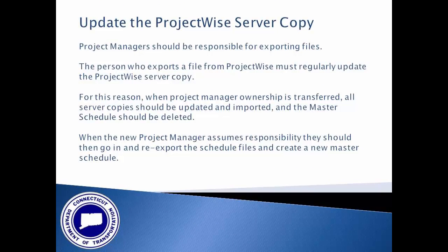Now that you and your project engineers are actively maintaining project schedules using the exported source file and the master schedule, you still need to keep the ProjectWise file up to date. This is because other parties interested in your project's progression need access to the most up-to-date version of the schedule. To do this, you are responsible for updating the server copy in ProjectWise. The user that exported the file is the only person that is able to update the server copy. For this reason, I recommend project managers export files because they are more likely to remain in that position for the life of the project.